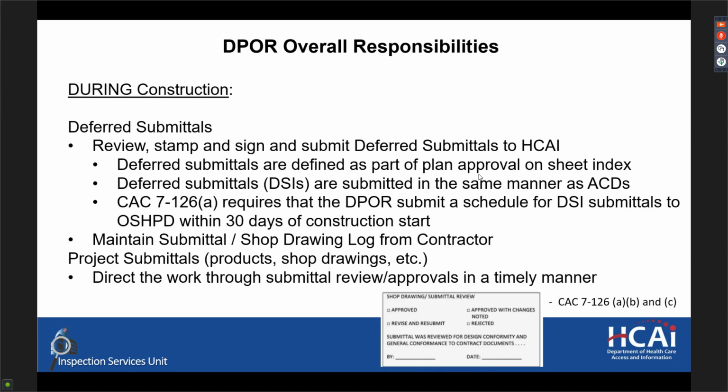So basically, shop drawings and submittals are considered as tools. So like you were saying, exactly, HCI doesn't base anything on the submittals or shop drawings, again, because those are tools. What we pay attention to are approved construction documents, which do not include, again, shop drawings nor submittals. RFIs might be NMA-ish, so it depends from case to case, but that is basically to reinforce what you were saying before.